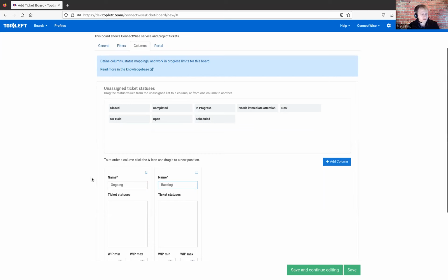Those would be for tickets that maybe have come out of your project templates, and so they exist, but you're not going to do them soon. They could be more than a month out, for example. So we just put those in a backlog. We're not worried that they're not going to be done soon. Then when a ticket gets closer to the time when you need to do it, we put it in the ready status. That means, as a project manager, I want to start planning for when we're actually going to do this.